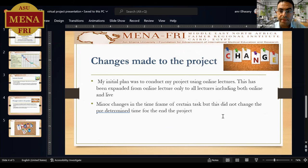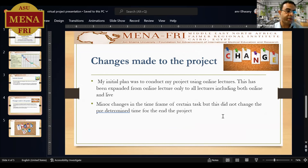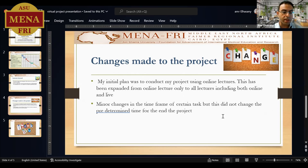The major change to my project is that my initial design was to use the student response system on online lectures alone. But because the COVID situation improved significantly, my school of medicine shifted back to live lectures. This is why I expanded the scope of my project to include both live and online lectures. Minor changes also occurred in the timeframe due to changes in the student schedule, yet these did not affect the overall project at all.